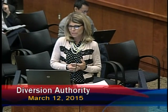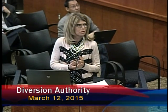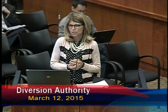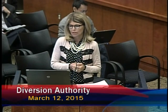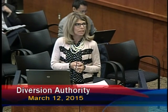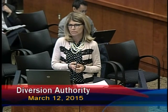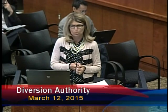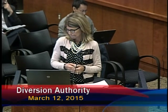If we don't get the field work done or the cultural surveys done, we'll still issue a report in June. It just won't contain the results of that survey. And eventually we have to get these cultural surveys done for the cemeteries, but it does not impact us issuing a report in June.